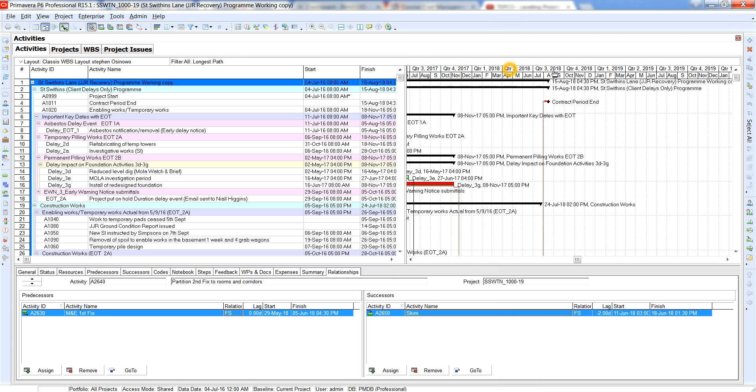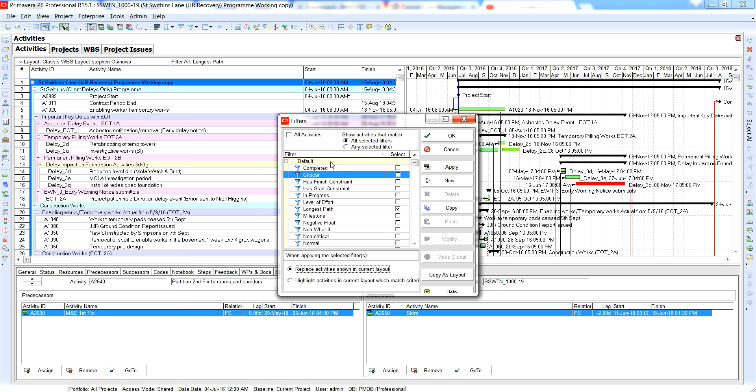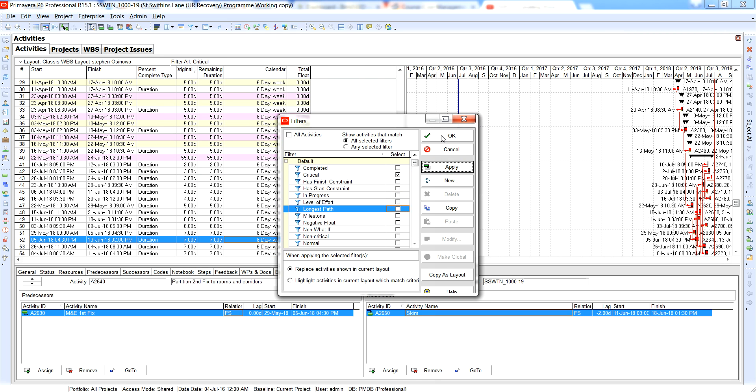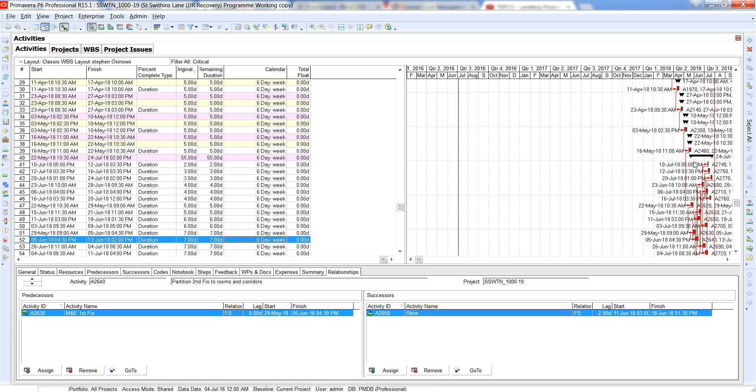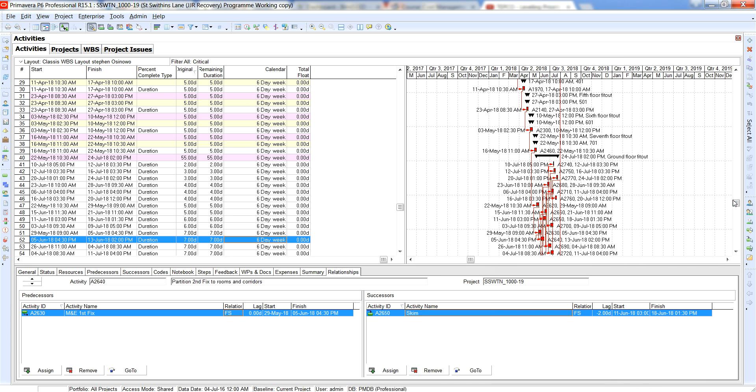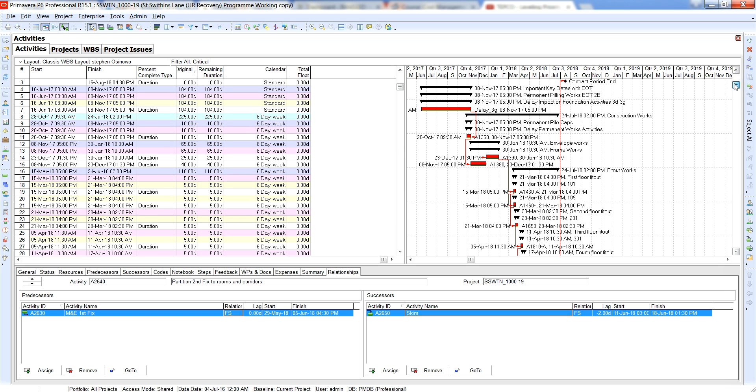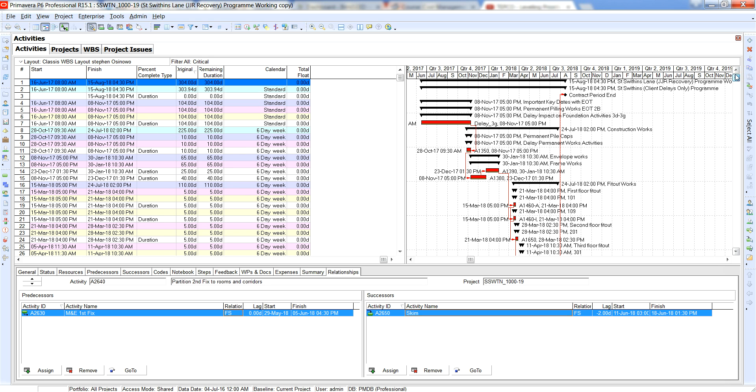Now it would vary, some people prefer to use the critical path. So you come over to the filters and there you have it, the critical path. You click on that, there you go. So literally all the critical path really is is all of the activities with a total flow value equal to zero.